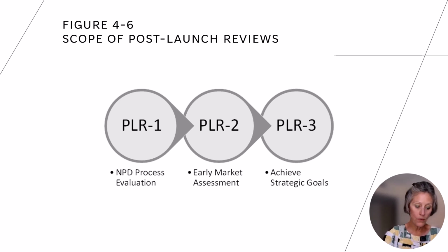Recall that in a waterfall process, the NPD team members may shift in depth of knowledge and expertise throughout the process. Gate 3 is one point at which the team members, except for the project manager and product manager, often have the highest rate of turnover. Skill sets for design and testing of ideas are very different than those required to design, build, and commission a factory for new product manufacture. Gatekeepers too may change at Gate 3 due to the increased costs anticipated during Stage 4 and 5.